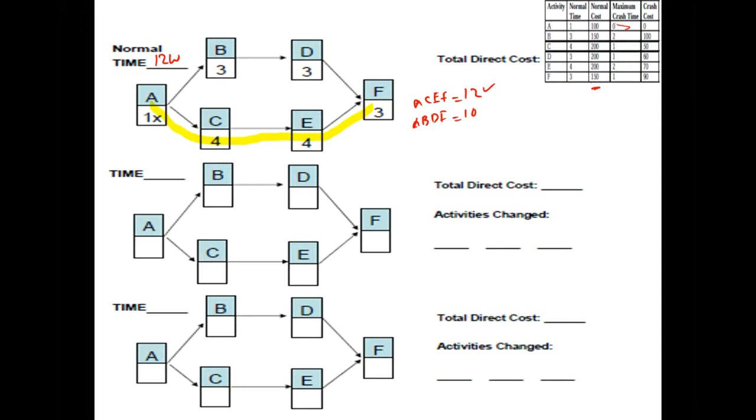So can anyone give a go and compute what is the total cost? Sometimes students make an error that while calculating the cost, they only calculate the cost of activities lying on the critical path, which is not correct because you have to deliver non-critical activities as well. So the total direct cost to deliver this project is 1000K.